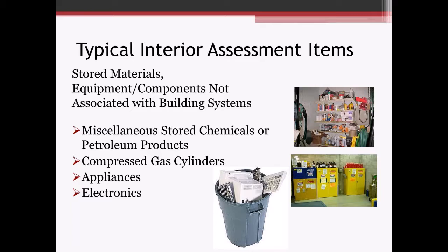during that demo. So if you have some miscellaneous stored chemicals or petroleum products, those things would have to be dealt with. Compressed gas cylinders, appliances, electronics. New York State has an e-waste law, as well as many other states. So you can't just take your electronic waste out with the normal trash. You've got to make sure that that's being recycled appropriately.